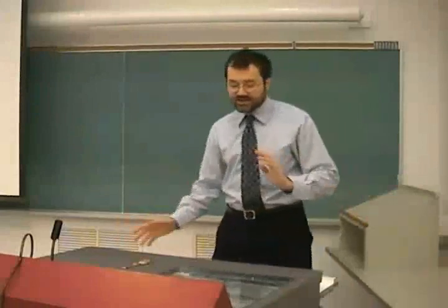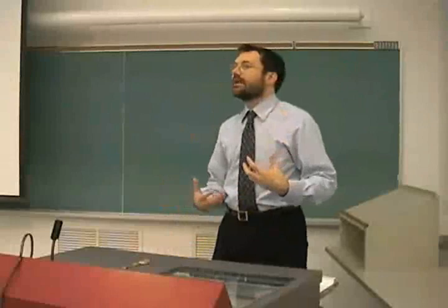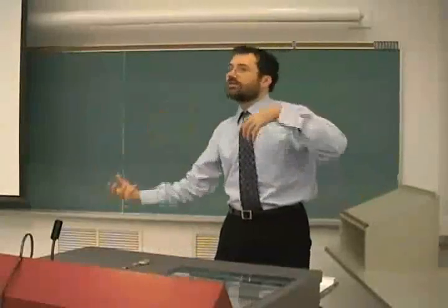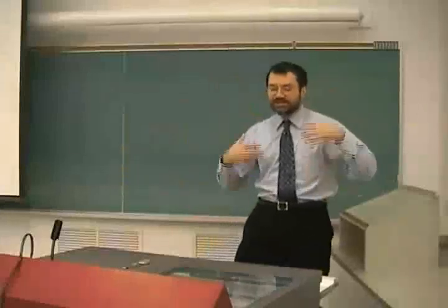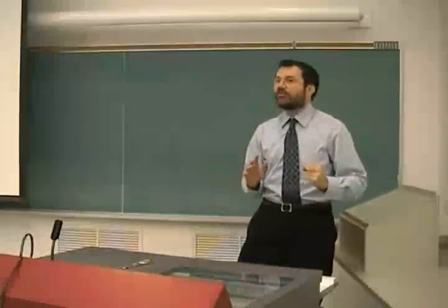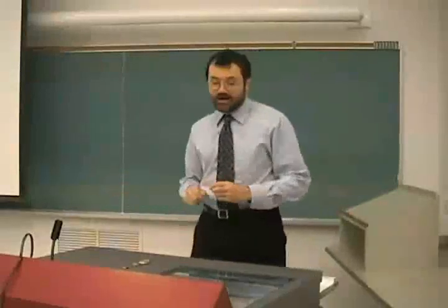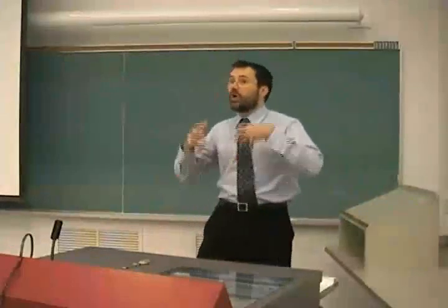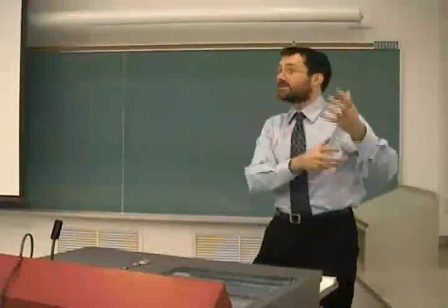And so what you need to do is you need to have a process in place that is aware of this tug of war between these two, the high quality and the deadline issues, that is managing the process, that is keeping track of the quality levels that are being achieved as different parts of the system get tested. Typically you have a separate quality assurance department that can be promoting the quality side, because typically the line management is promoting the deadline side.